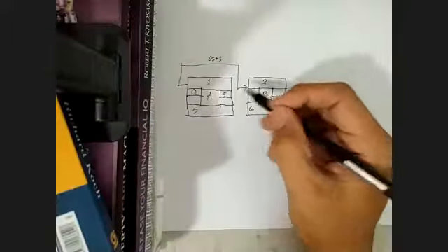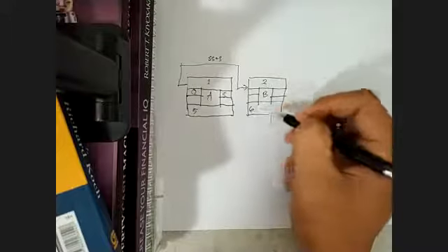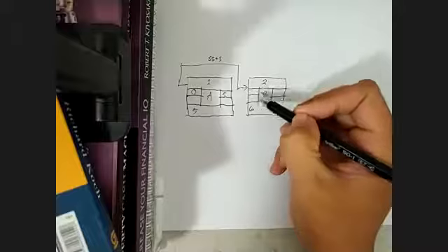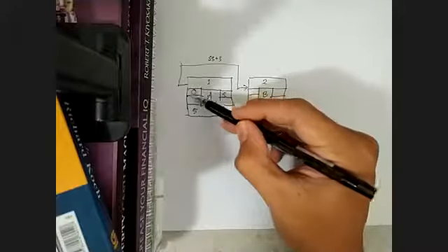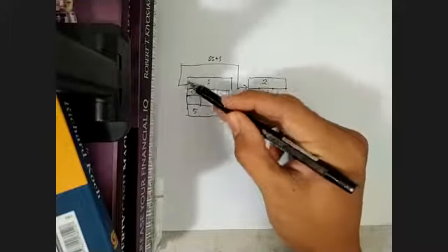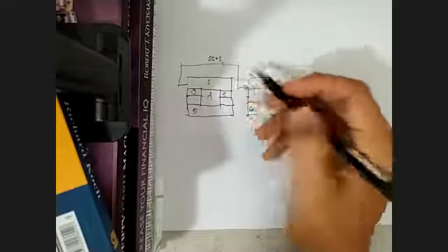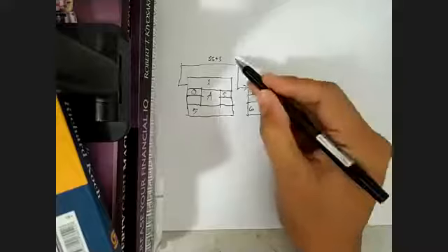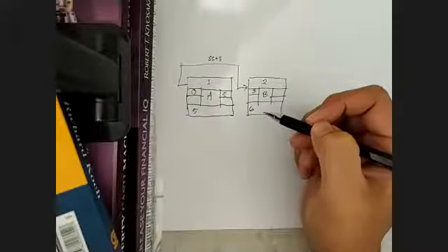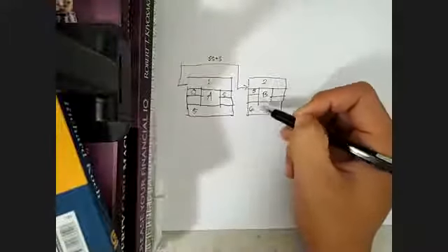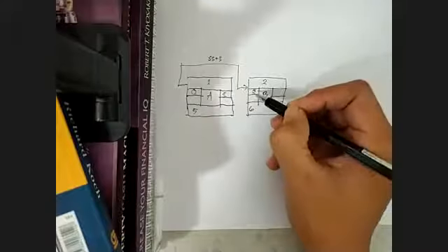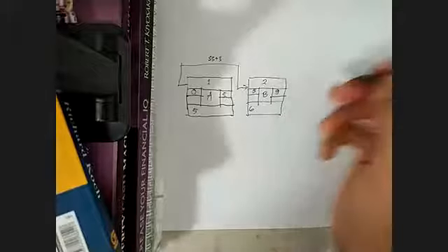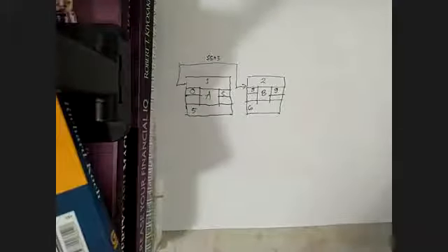The next step that we have to do is calculate the column in P. It will be different from CPM. We will calculate the start of activity P by increasing the 0, since the 0 is on the left position of A, with 3. 0 plus 3 is 3. Okay. After we complete all the arrows that are contained in the P activity, we can directly fill the early finish by increasing 3 with 6. So we get 9 over here. Okay. That's the first step to doing this work.